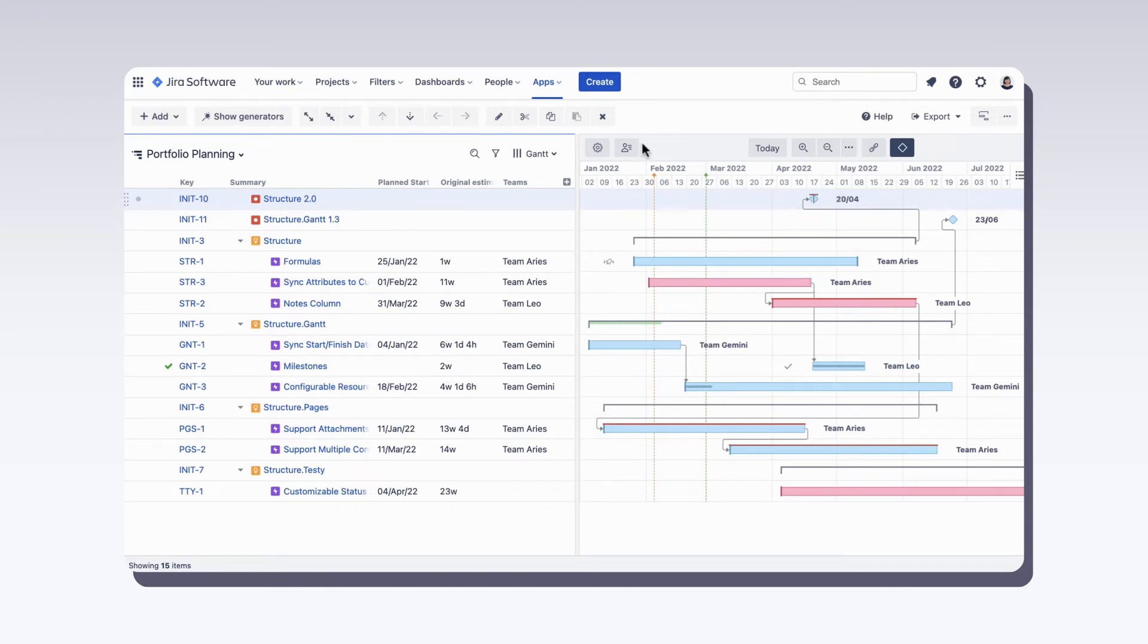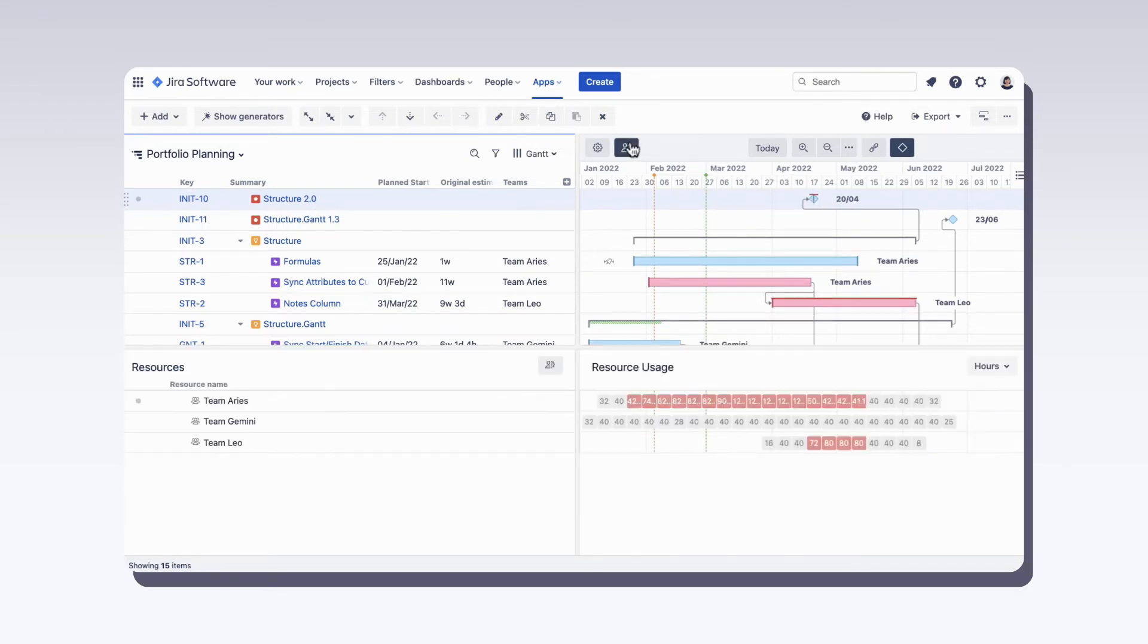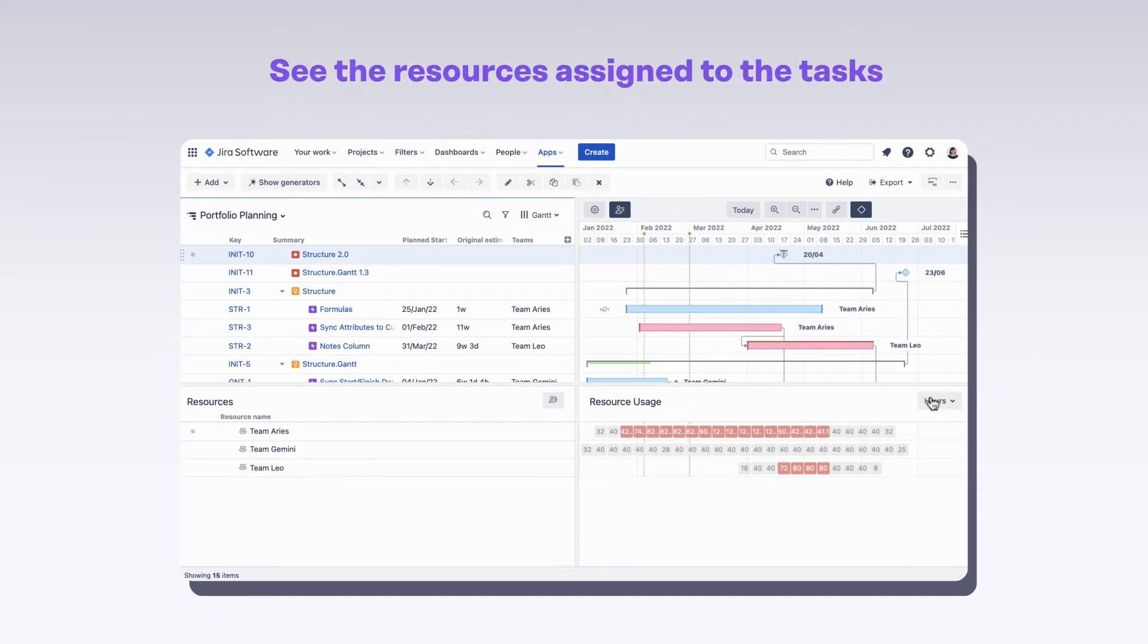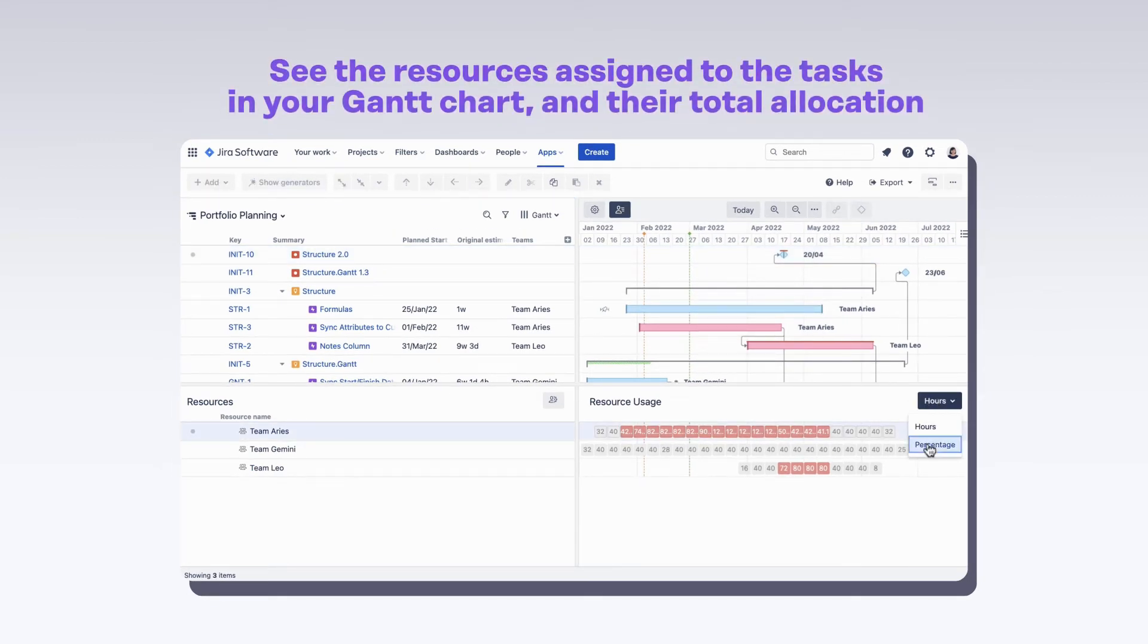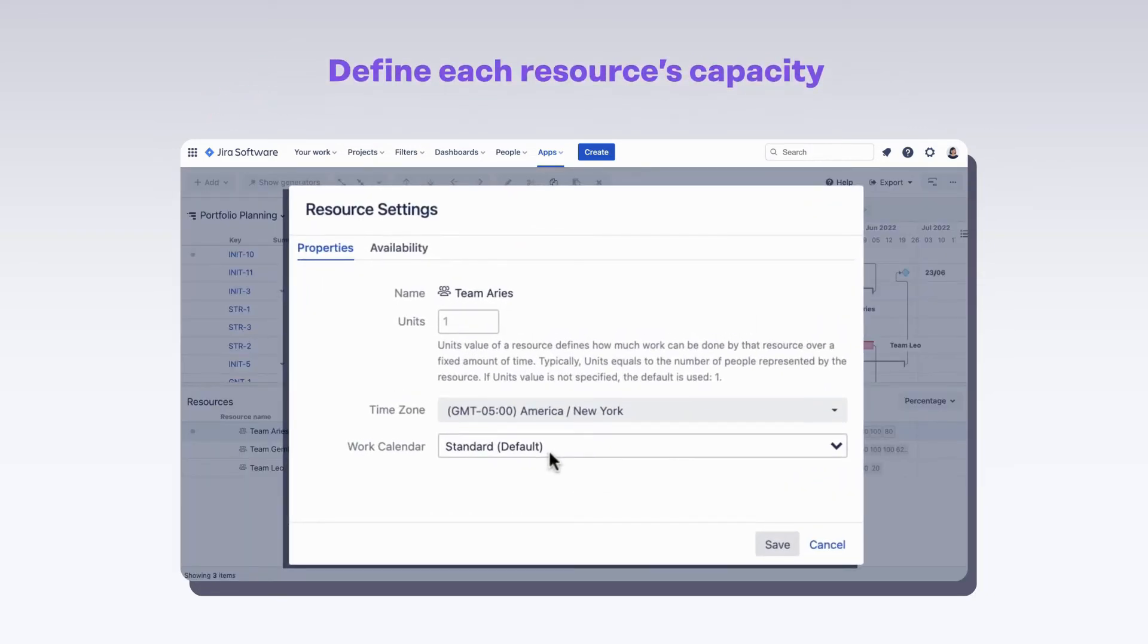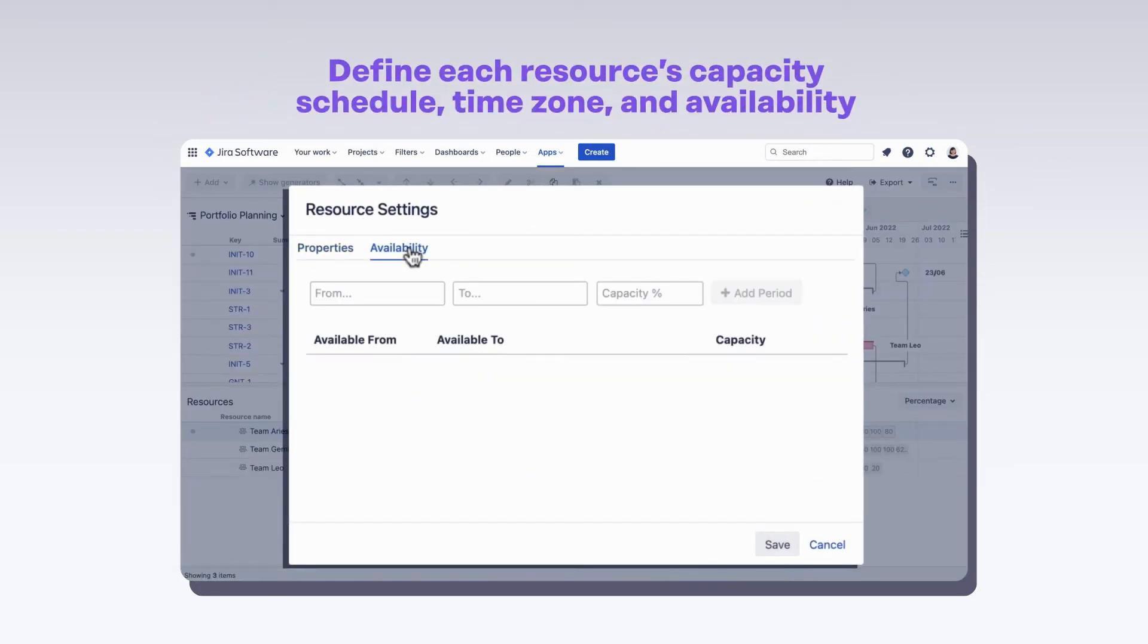You can also open the resources panel, where you can see the resources assigned to the tasks in your Gantt chart and their total allocation. You can define each resource's capacity, schedule, time zone, and availability.